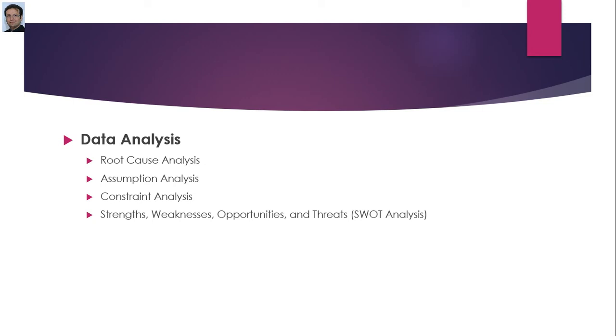Root cause analysis is typically used to discover the underlying causes that lead to a problem and develop preventive action. It can be used to identify threats by starting with a problem statement, for example, the project might be delayed or over budget, and exploring which threats might result in that problem occurring.